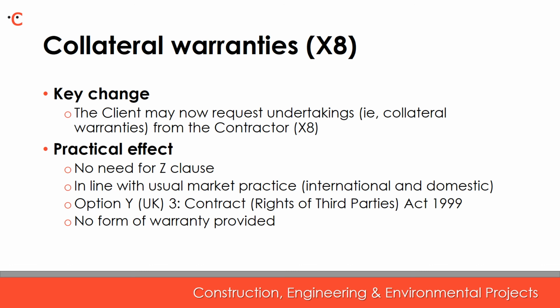The reference on the slide to option Y, which incorporates the Third Party Rights Act, which is not new, is merely there to note that the industry has not embraced widely using third-party rights rather than warranties. The continued use of collateral warranties is in line with market practice both internationally and domestically, and this amendment should avoid the need for Z clauses. However, no form of warranty is provided by NEC, so that will need to be prepared by the parties.